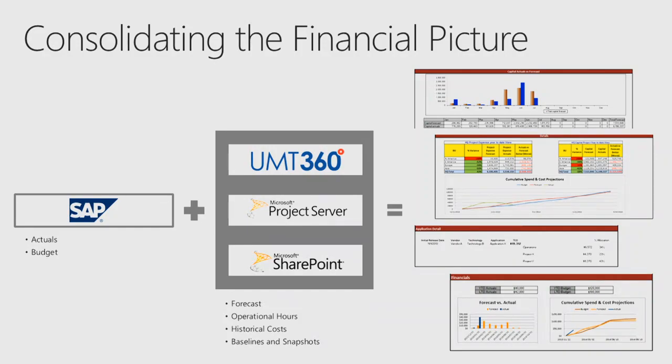And they're doing these status reports, and they have to go to SAP and write their time, and they have to go over here and update a project plan. So by linking it all together and putting it with TFS, I put my line item in there that's 40 hours, build X. They come over to TFS, they see it in their workflow, which whoever I've assigned, it's all linked. Hans opens it up, sees it in his workflow, and then he can build that out to the other 40 line items that he needs, so he knows every step of the way. And then as he does stuff and works in TFS and checks those boxes, it's updating project for me. And by updating project with the time he put over here, it's updating SAP also for the time to build that WBS code. So he gets to stay in TFS, and he gets to stay happy because he's developing. That's what he wants to do.